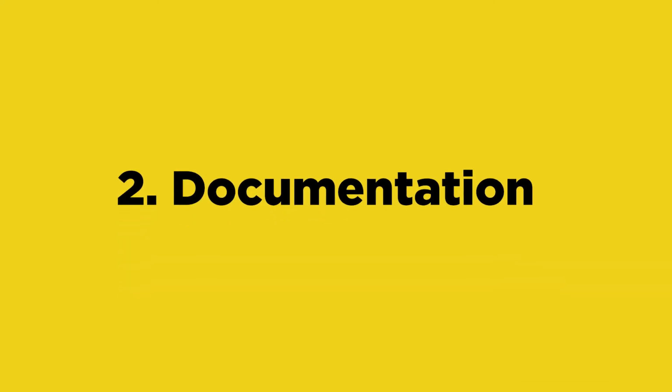Outside of communication, again, that's a big part of your daily task, is communicating to everybody who needs to be communicated with. But documentation is huge. If it's not documented, people start to get amnesia and they forget what you guys have talked about. And so every line of communication should be documented. We have a folder within Dropbox called Meetings, Strategies, and Notes. So a lot of those important documents should be stored there, timestamped with the correct date. And then a lot of times what's easy to do is just document it through an email, send it out to the client, and then save it in their folder as a PDF. Save that email as a PDF, but make sure that all communication is documented and then clearly communicated to the team.